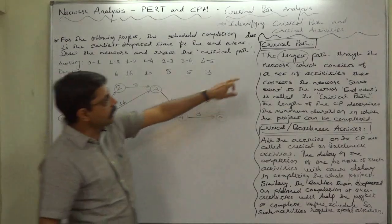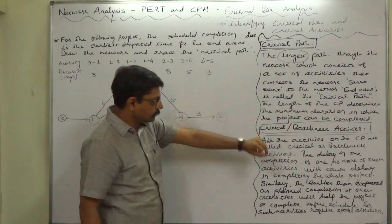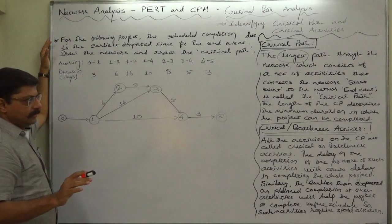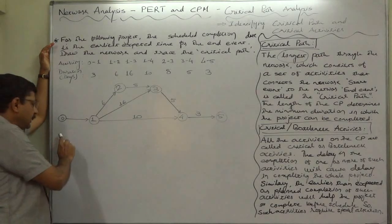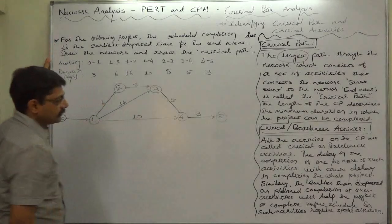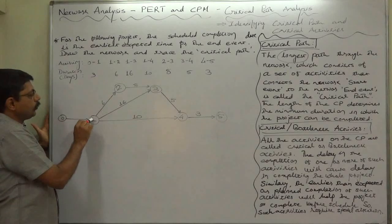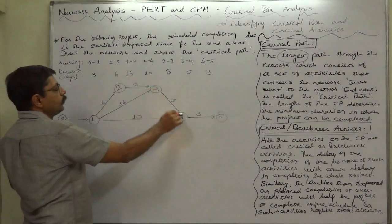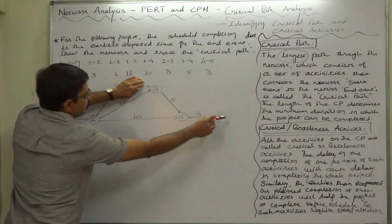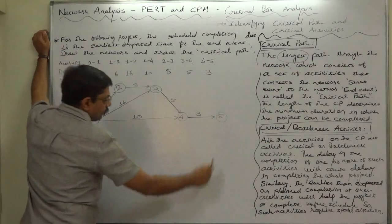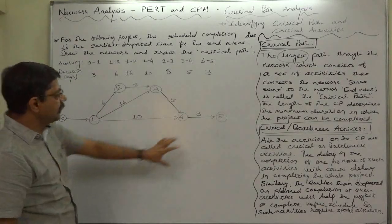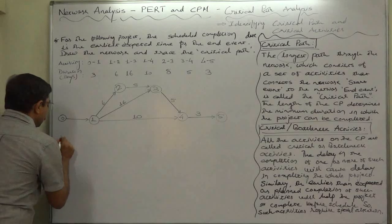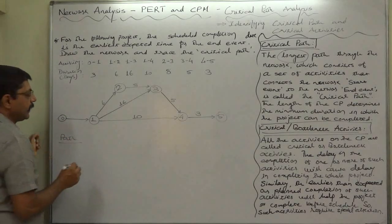Let's first think about which path is the longest, meaning the one having the longest duration. Let's check how many paths are possible from the start to the end of the project. The first path is 0 → 1 → 2 → 3 → 4 → 5. Another possible path is 0 → 1 → 3 → 4 → 5. The third path is 0 → 1 → 4 → 5. So in three different ways we can reach the end event from the start event, and all these paths have different durations.